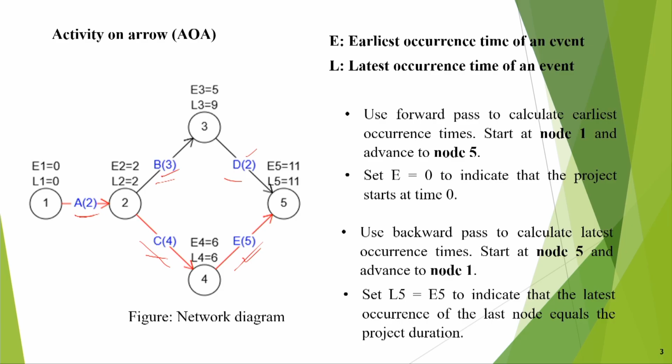And now, suppose durations have been given, how do we carry out the forward pass? In the forward pass I can set E0, that means the earliest starting time of that event, E0 equal to 0.